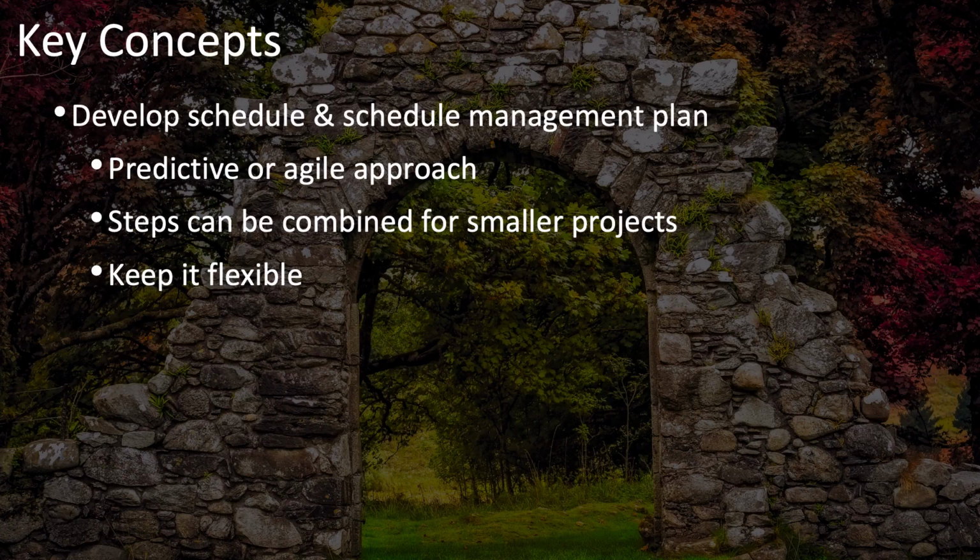For smaller projects, you can usually combine the processes of define activities, sequence activities, estimate activity durations, and develop schedule, and do them all at once. But because the tools and techniques are distinct, they are presented as separate processes.